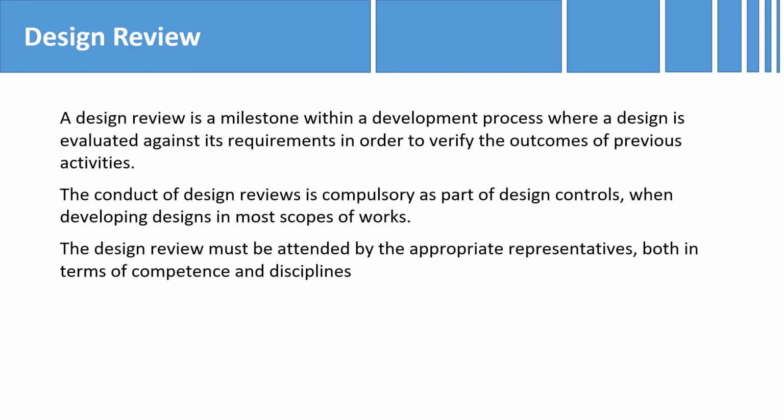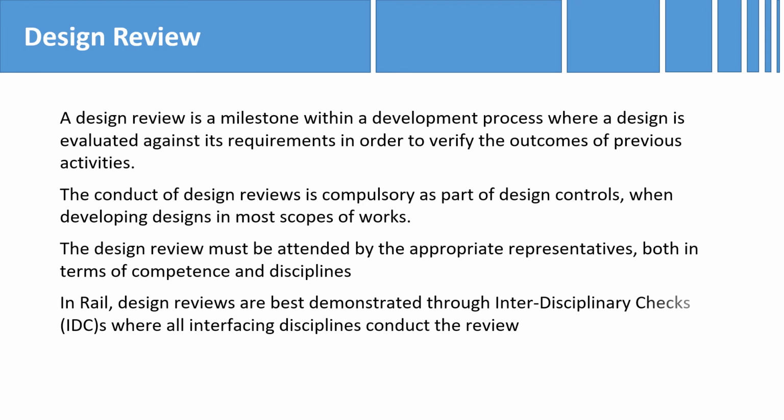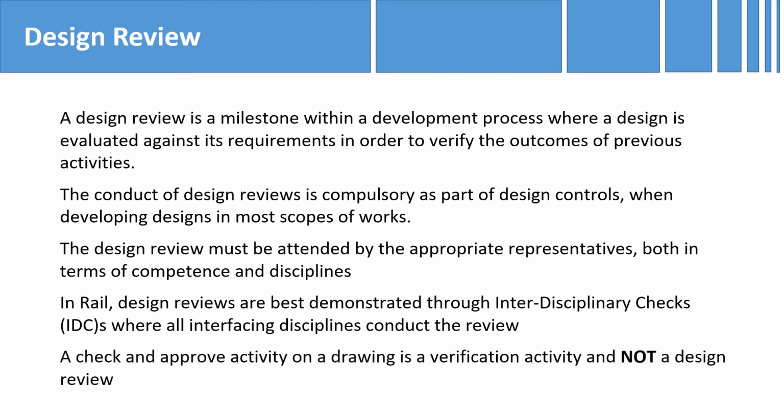In rail, these reviews are generally carried out in the form of IDCs, that is, interdisciplinary checks. And no, contrary to some views, a check and approve activity on a drawing does not constitute a design review.